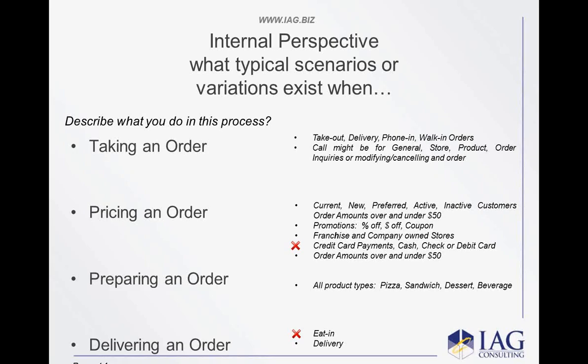Is this during scoping, before the project is approved? Allison, typically that's where I would go. You really need to think about bolting this in because it's a very, very fast process. If you're dealing with a $1 to $2 million project, you're only going to spend about 4 hours doing this. You might even spend only about 2 hours and just get the basics figured out. And that way, it might make it easier to determine if a project should be approved or not.